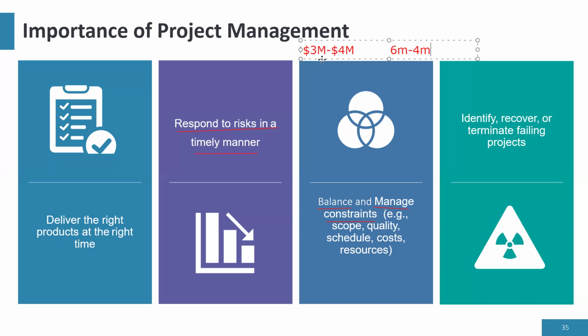Okay. I will increase the resources, I mean, human resources, to an effective level. Maybe if two people are meant to finish the work, and I see that if I increase to 3 or 4, they will still work but deliver it at an earlier time, then I will increase the number of people doing it. And if there's any way I can introduce the use of machines to make it faster, I will do that, since there is enough budget for that. Okay. All right.